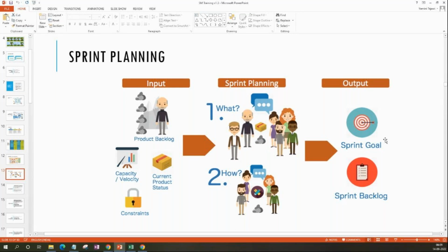So all this is based on the basic requirements by the customer, right? Correct. From the customer, it flows to the product backlog, to the product owner, then flows to the development team, then is taken for implementation. So if during this process the customer makes any more changes, what happens? Is that allowed? During this process, no. Once the sprint is started, we are not allowed to modify. Only the product owner, business analyst, that is you, has the capability to cancel the sprint. But that is in extreme cases where the requirements completely change, not for small things, not any additional requirements. Correct, exactly. Any other questions?